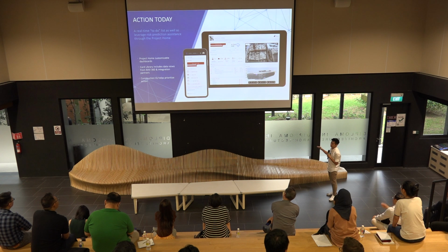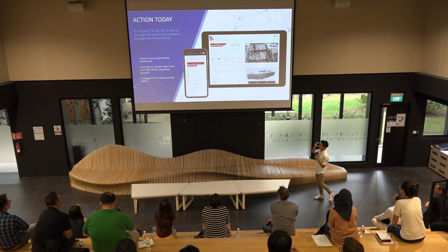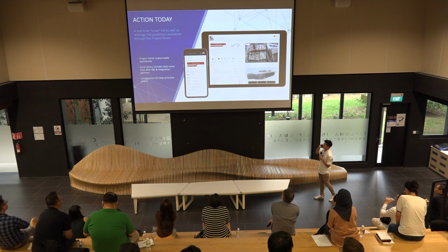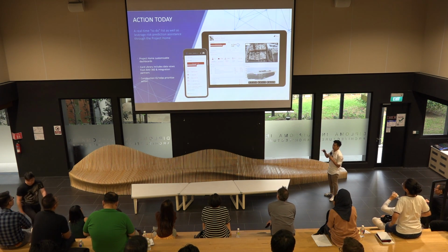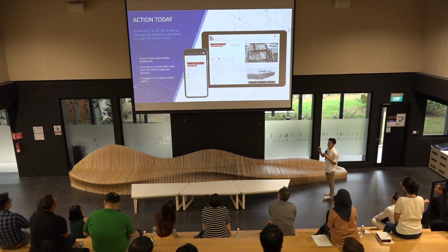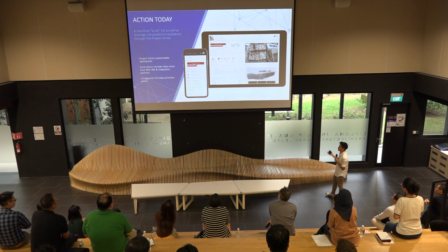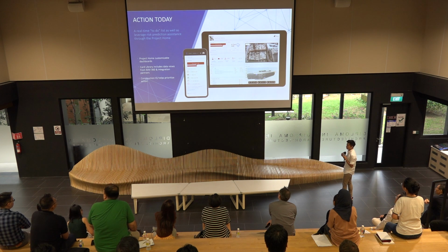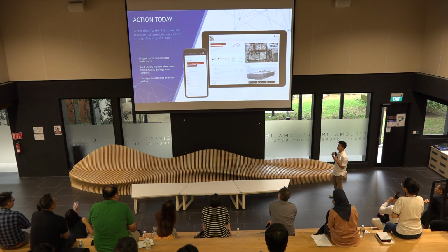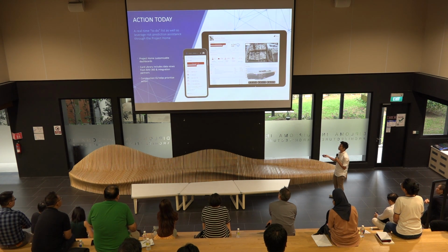And every day, the system will alert you what is the high risk on that particular day, whether the risk is because of the weather, because of the workers, or because of the drawings and so on. Now, the more data that you put in BIM 360, the more accurate the system will do the analytics and prediction for you. There's an algorithm at the back end that keeps running every time you key in the data. Those are the things that people start to look into to do the prevention, and also the predictions before something happens.